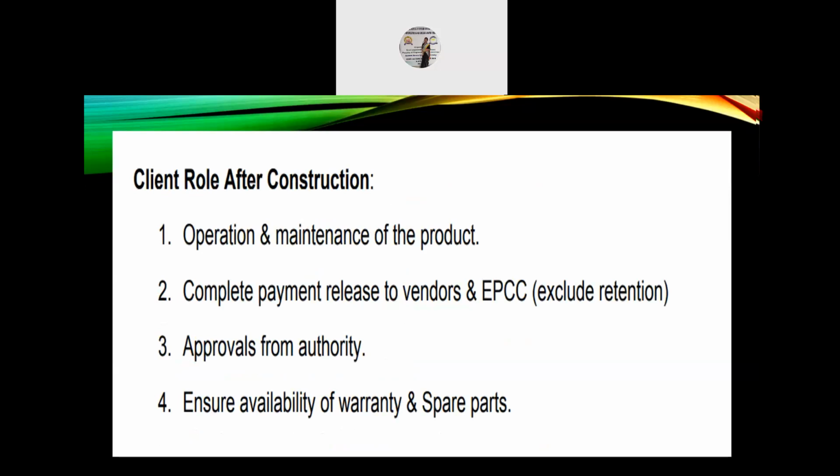Client role after construction. Number 1. Operation and maintenance of the project. Number 2. Complete payments released to vendors and EPCC, which includes retention. Number 3. Approvals from authority. And number 4. Ensure availability of warranty and spare parts.